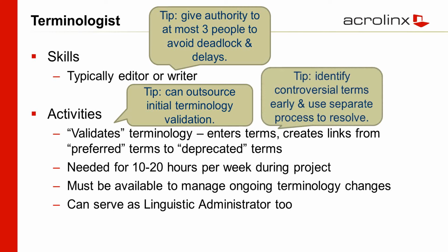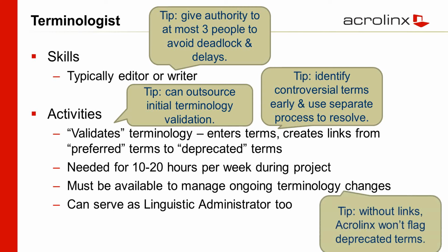But for those terms that you think may be controversial, it's a good idea to identify those terms and have a separate process for resolving those terms. And my advice, by the way, is this separate process doesn't mean that everyone gets a vote. You should try to set up a process so that a group of between 1 and 3 people have the final say, but they get input from a much larger group. That's ideal, and it isn't always practical.